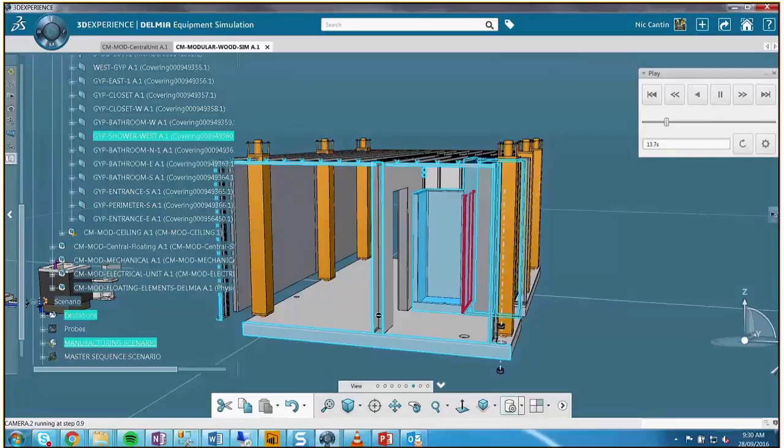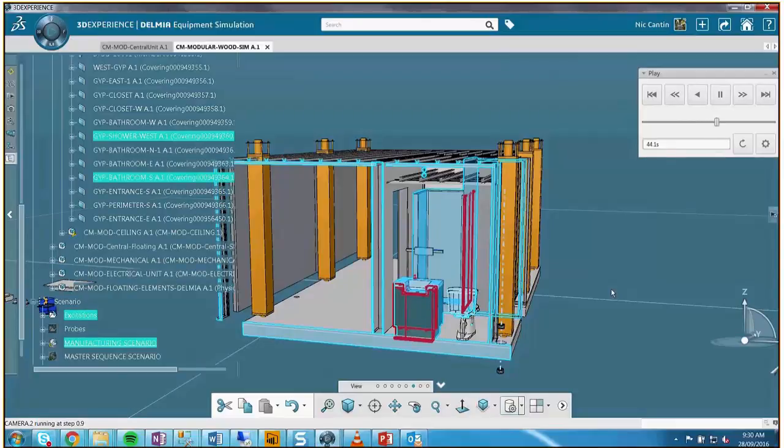And I think most times in a construction scenario, you're really just trying to put things together and see if there's any clashes in a trajectory or installation context. So being able to quickly generate an animation or an assembly sequence really helps with that. And also what you can do with this scenario is 4D clash. So not only do you have the 3D clash, but the 4D associated to the time and the trajectories of each of these elements coming together.